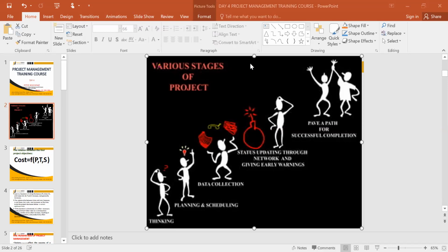From the start, I do what we call identifying the stakeholders. Let me have a stakeholder register. Conduct a power-influence matrix of each and every stakeholder so that you can determine the level of your engagement with each stakeholder that you have highlighted in your register. Then go direct to come up with a charter.